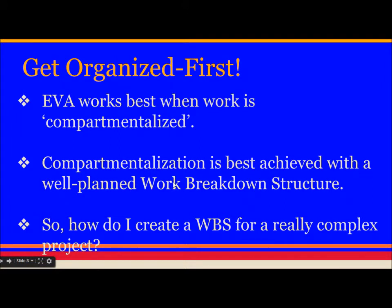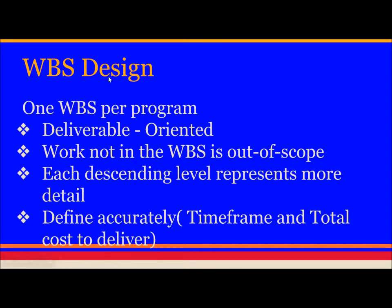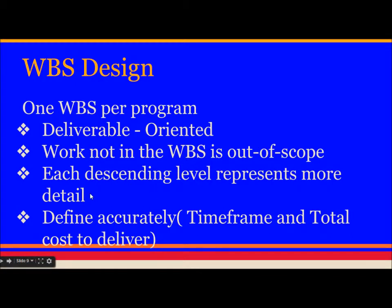Compartmentalization is best achieved with a well-planned work breakdown structure (WBS). Design one WBS per program — it is deliverable-oriented work. Whatever is written in the WBS defines the scope; anything not mentioned in the WBS is out of scope. Each descending level represents more detail, and you define accurately the timeframe and total cost to deliver.